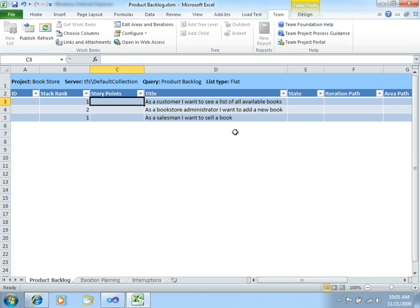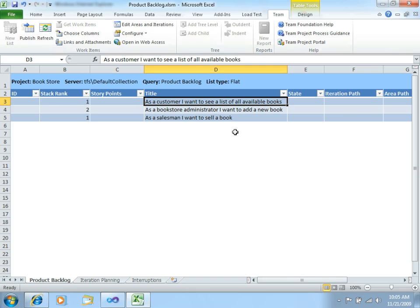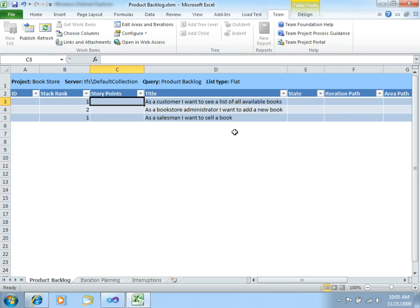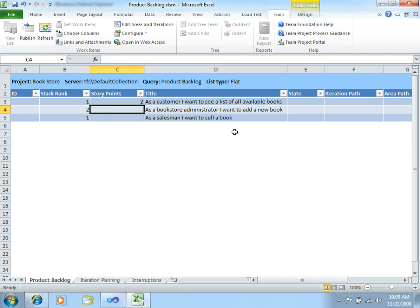So, now, having these three User Stories, I will estimate that the first one, the customer wants to see the list of available books, is not really too much complicated. So, let's put two story points for that one. The next one, I want to add a new book. Well, you have to do some insertions in the database. So, let's give a little bit more complexity to this one.